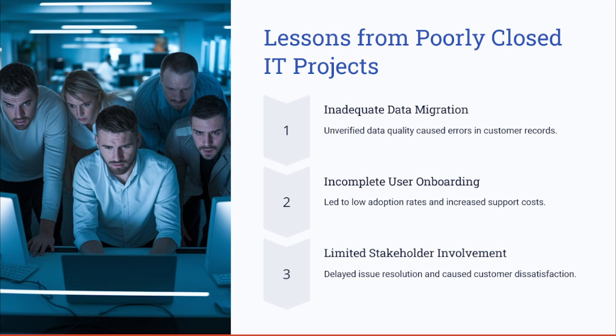Some of the lessons learned come from poorly closed projects, including a CRM system where it was deployed with inadequate data migration and low testing, which led to significant challenges. Also, the unverified data quality caused errors in customer records, incomplete user onboarding led to a low adoption rate, and limited stakeholder involvement delayed issue resolution. These missteps resulted in customer dissatisfaction, increased support costs, and the need for costly rework.